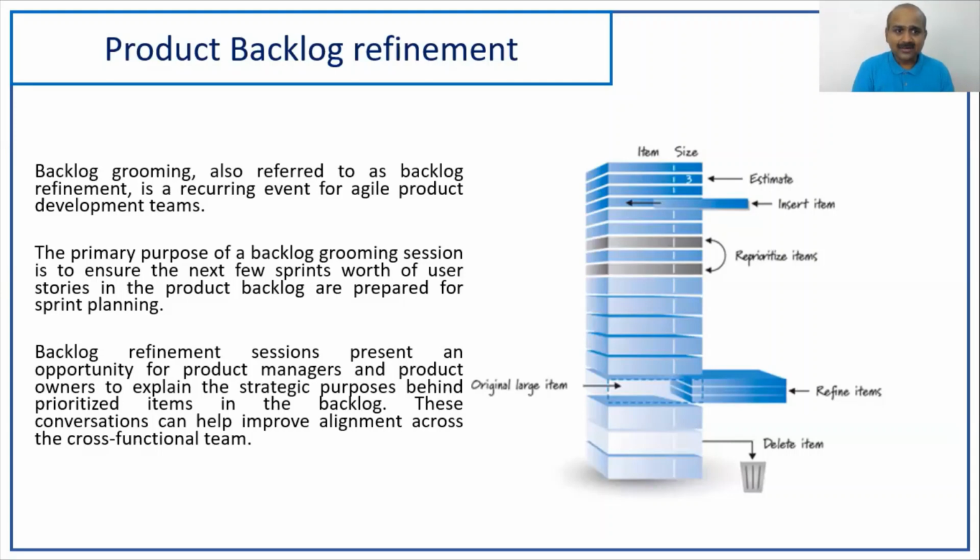What is grooming, my friend? Why are we using the word grooming? Grooming is all about taking a comb and grooming your hair, right? Ungroomed hair looks haphazard. Groomed hair looks like, yes, now I'm ready, I can go outside. Likewise, a groomed user story provides a clearer description about what is to be developed. The primary purpose of the backlog grooming session is to ensure the next few sprints' worth of user stories in the product backlog are prepared well, so that the sprint planning can be completed in its duration.